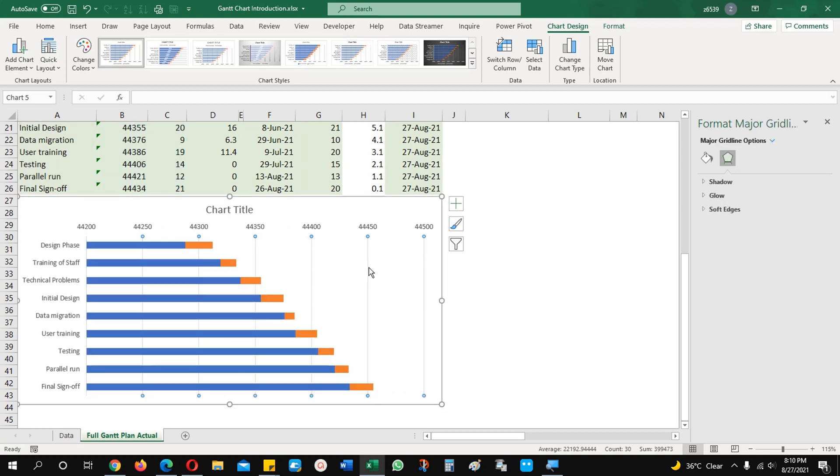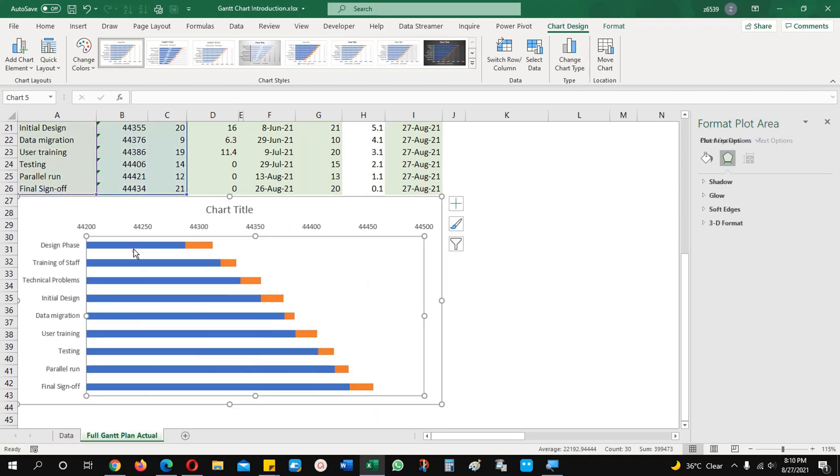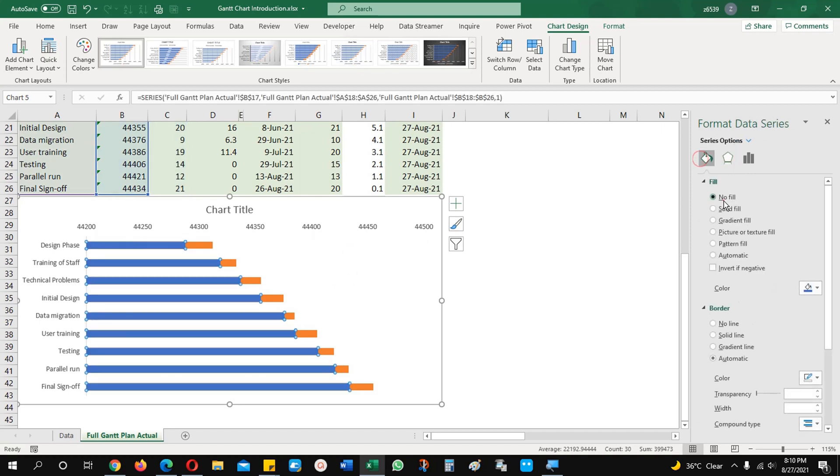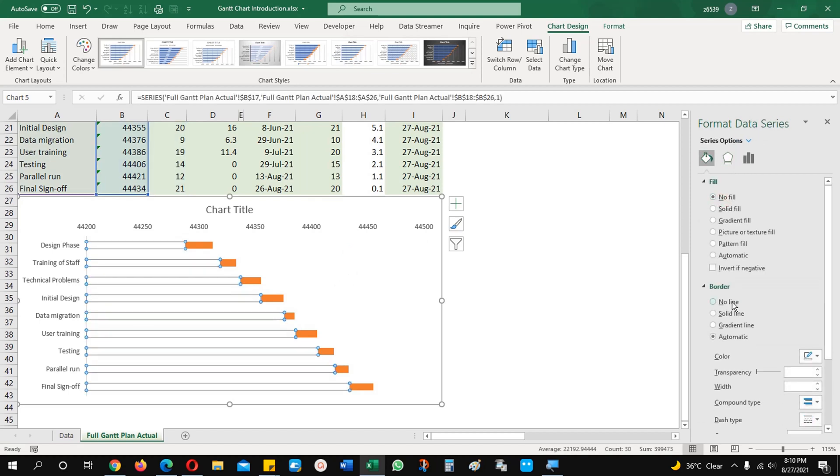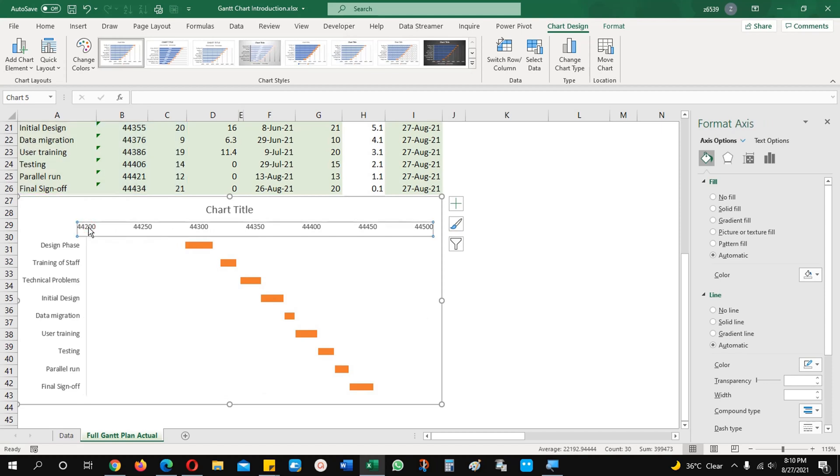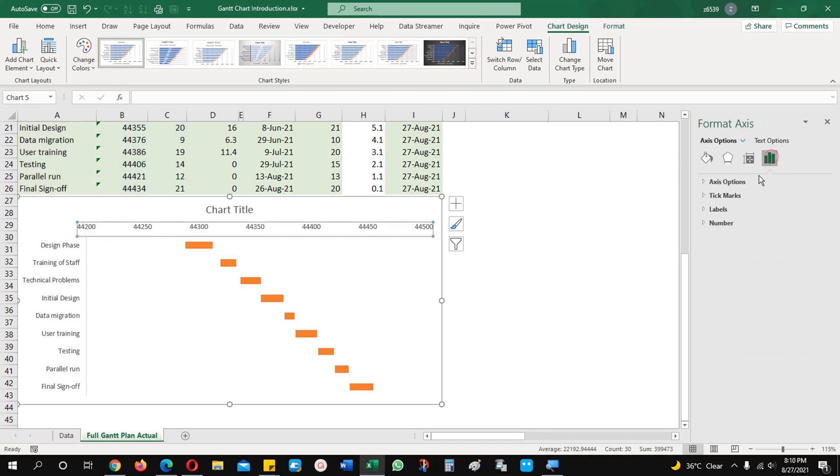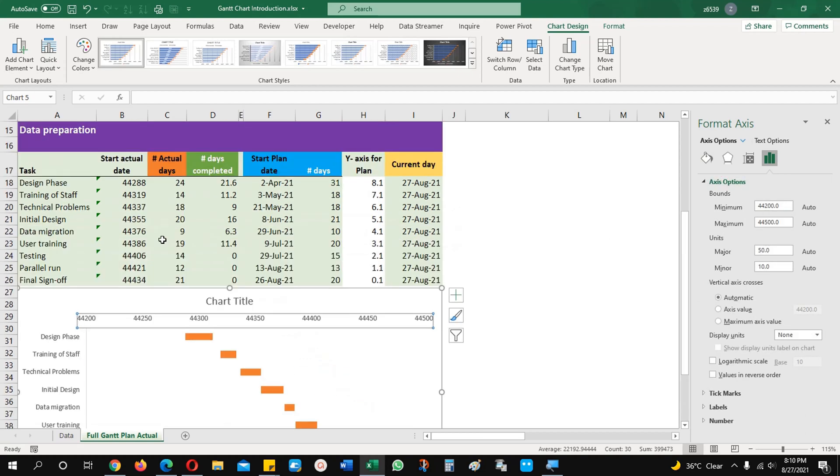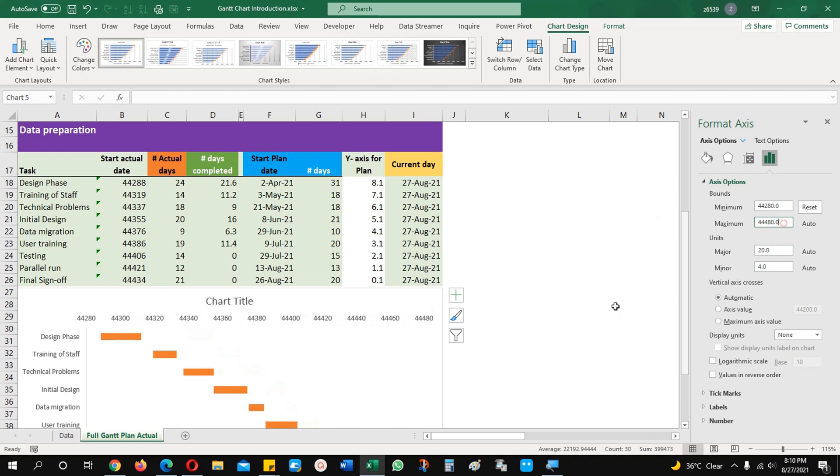I am going to remove these bars as well. I will change the color of this one. I don't need any color, no line and you can see my dates starting from here. Here is a gap. I will just click on the dates and you will come here on the bar chart X axis option and choose this number either above or equals to this number 44280. I am selecting and you will see my bars are moving towards left side and space is there with me now.